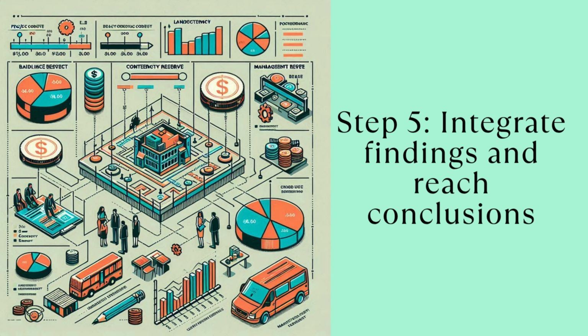Step 5. Integrate findings and reach conclusions. Don't just estimate your reserves, embed them in your cost baseline. Track them separately so you don't spend them like regular funds. Communicate clearly to stakeholders that reserves are for risk mitigation, not budget padding.